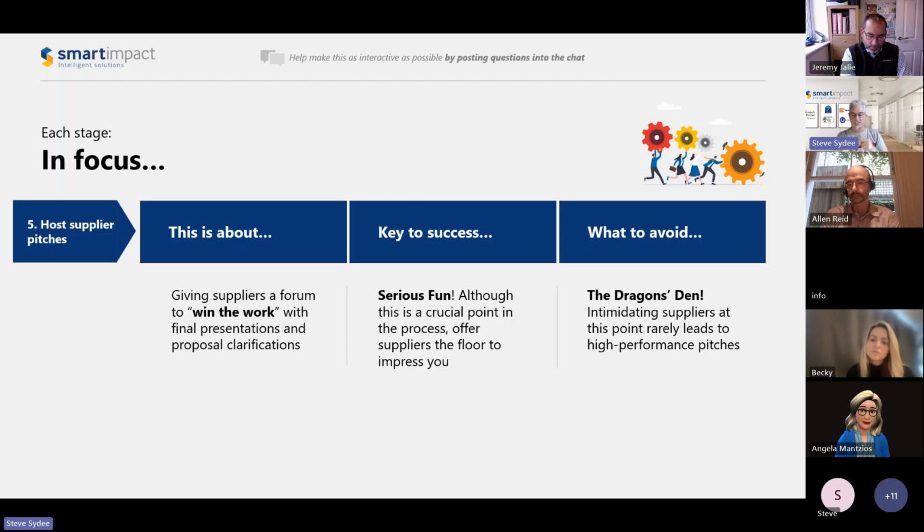So I would advise organizations to spend at least a couple of hours, if not a morning or an afternoon, with each prospective shortlisted supplier, because there should only be 3 or so of them, so it's not a lot of time. But make sure that there's enough time, and it's not all presentation. There's some break time, coffee time, where you can have a chat and find out what people are really like as well, because these are the people you're going to be dealing with for the next 5 years. So ask them to bring along project managers, ask them to bring along the delivery people, not just the sales guys or the exec board and so on, because I think that's very important.